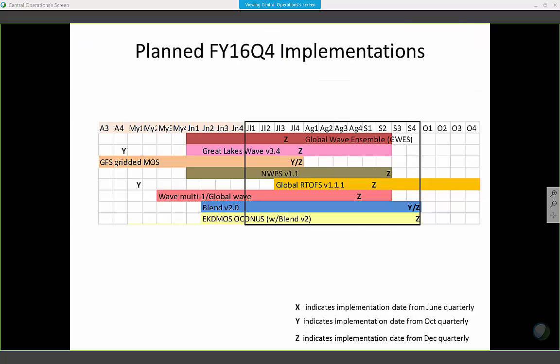The one that gets my attention there is the blend. Hands down, top priority. And it's running on the CRAY. Beautiful. And an AOP milestone. Okay. All right, and you notice the delivery is at the end of the quarter, so we've got to do everything we can to accelerate it and hit in the middle of the quarter instead of the end. Right? So you guys, I know.